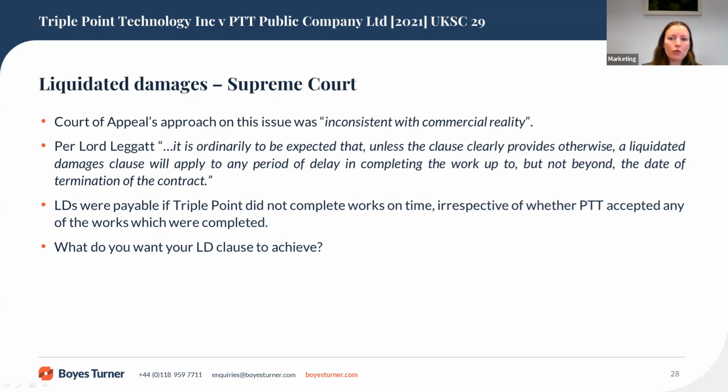Lord Leggatt added an additional reason for allowing the appeal, stating that it is ordinarily to be expected that unless the clause clearly provides otherwise, a liquidated damages clause will apply to any period of delay in completing the work up to, but not beyond, the date of termination of contract. So after the shift in direction by the Court of Appeal, the Supreme Court's decision restores the clarity around liquidated damages claims where a contract is terminated before the work is completed.